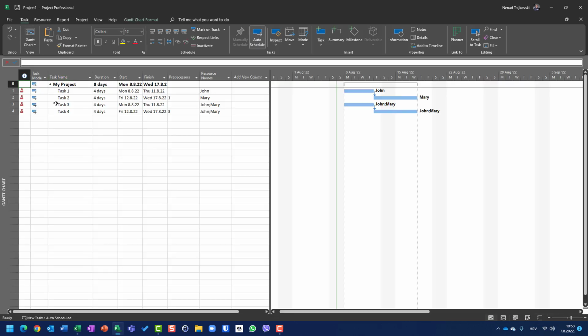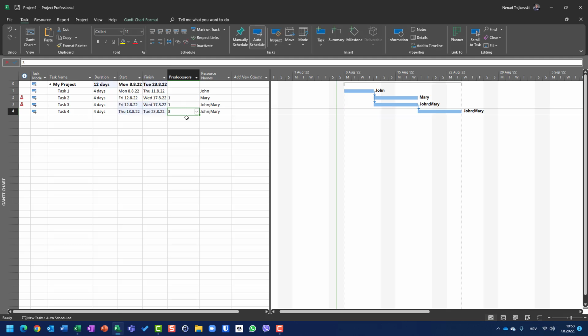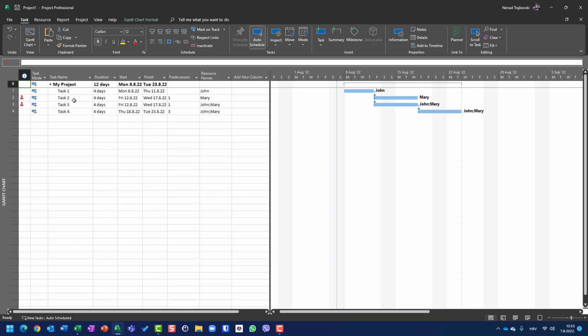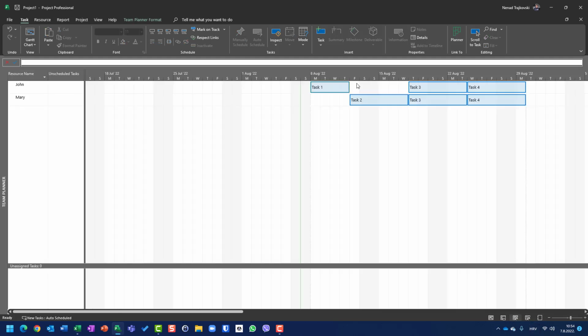I go here and I say, okay, John is not going to work on it, or I will put, let's say, predecessor task 1, so John is not going to be over-allocated. Let me see if I get it. Okay, John is not over-allocated, but task 2 and task 3, Mary is still over-allocated. Let me go back to the Gantt chart and see, okay, Mary is over-allocated. Okay, I will say that Mary is going to work on that task after task 2 is finished. As you can see, now I can see in my Team Planner that everything is fine.